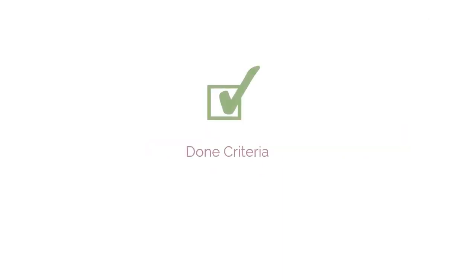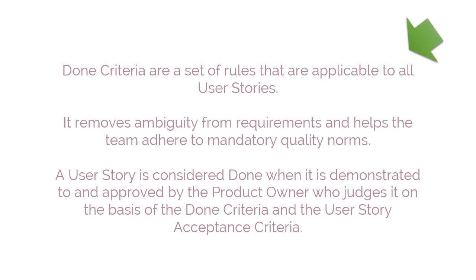Done Criteria. Done Criteria are a set of rules that are applicable to all user stories. It removes ambiguity from requirements and helps the team adhere to mandatory quality norms. A user story is considered done when it is demonstrated to and approved by the product owner, who judges it on the basis of the done criteria and the user story acceptance criteria.